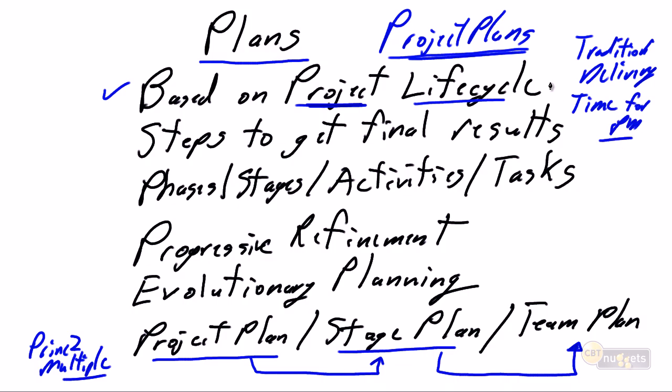So our project plans need to address both the project delivery lifecycle, analysis, design, development, as well as ensuring there's time in the plan, WBS elements identified, for all of the PM activities. And that's not just so that we can justify where Steve is spending his time and to provide a guide for Steve to spend his time, but it's also that we have time for the PM tasks that we're expecting from our team members.